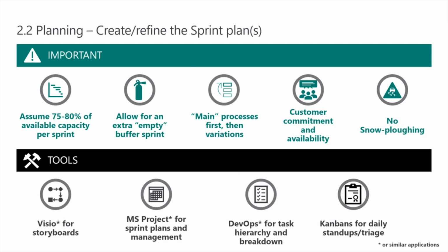Where you can create contingency, and we'd recommend you do create a contingency, is if you think you can deliver this in 6 sprints, add a sprint number 7, which is empty. It has no committed backlog allocated to it. There's nothing in it. You use that sprint to absorb any things that go wrong during the first 6 sprints. Right? It allows you, therefore, to then honor the dates that follow the completion of the solution.